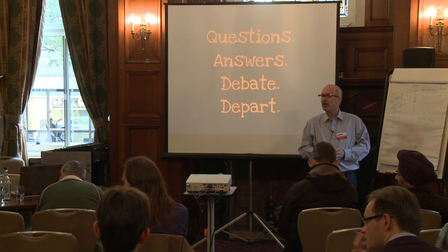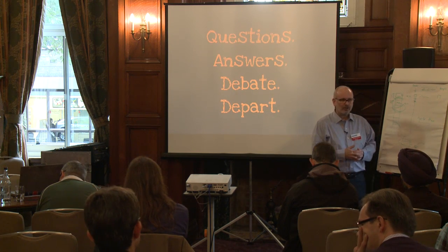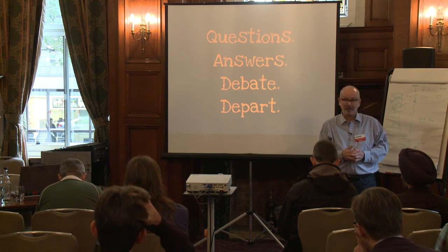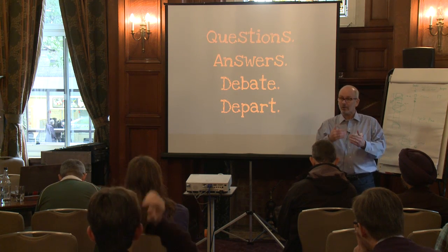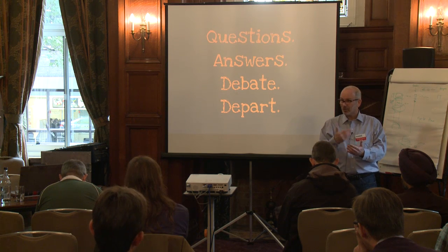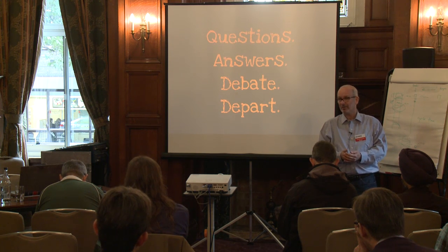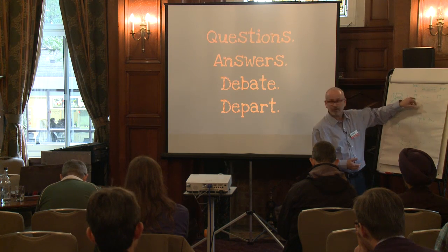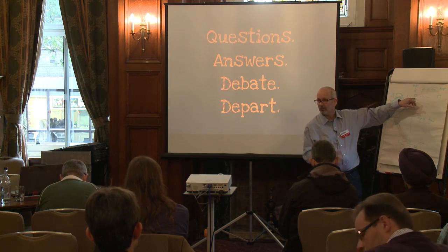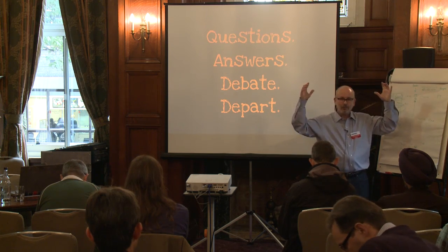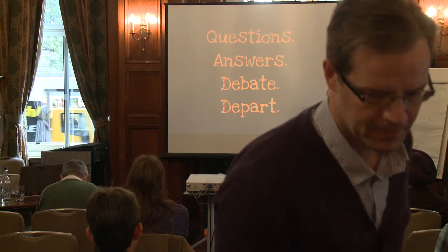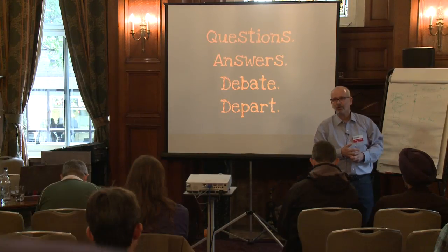Right, yes, they come off of the product teams. There's no estimation, right? So we really don't know in advance how long it's going to take to get something done. We would like it to get done within the iteration. That's the plan, right? So once their work item comes up, and they embed with the right product team, they're there until it's done. And again, we like it within that iteration, but it doesn't have an iteration boundary.